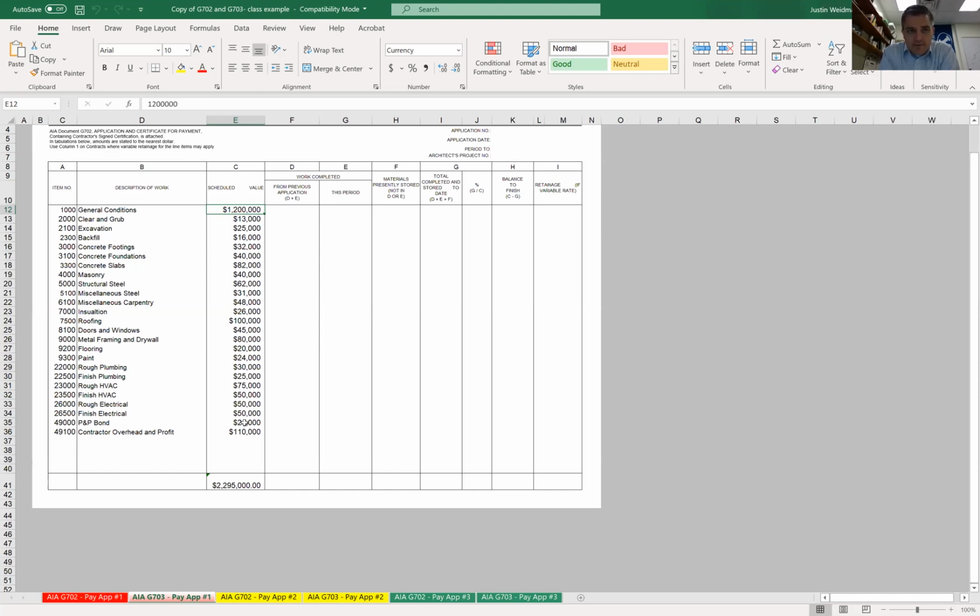So if they say, oh, concrete footings, I can look and say, yeah, those are done, then that's great. But then they still know that they've still got money out there for foundations and slabs and other things that they're looking at, so that they know exactly what they're paying for. So be forthright with the owner, be honest with them, show them what they're getting, give them enough level of detail so that they don't have a lot of questions, but don't overwhelm them at the same time.